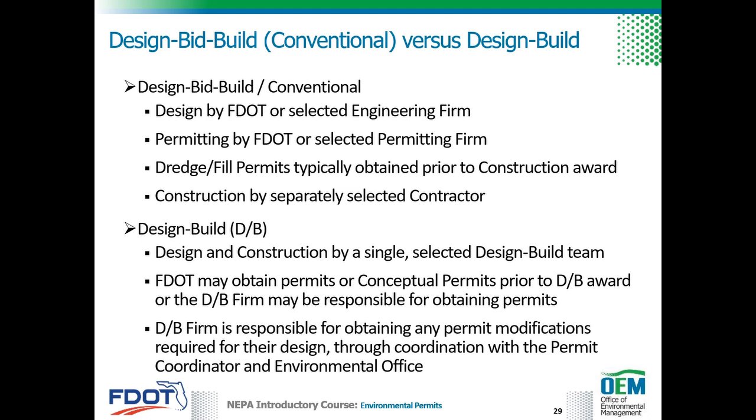Commitments made during the PD&E study should also be followed closely when considering alternative technical concept proposals, especially given the extensive public involvement conducted prior to finalization of the PD&E documents. A change in an interchange concept could require extensive coordination and additional approvals and/or public involvement through the NEPA process.